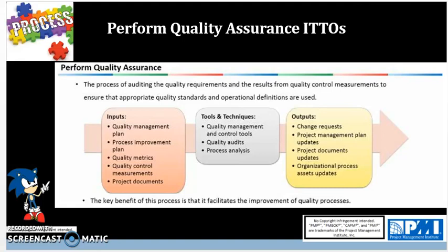Process analysis is a proactive approach that follows steps outlined in the process improvement plan to identify improvements and waste in the processes. We can do this through the use of flowcharts. And here we are identifying problems, constraints, and non-value-added steps and activities in the process operation. It also includes root cause analysis through the use of a fishbone or Ishikawa diagram to find the root cause of a problem. And process analysis is a great way to figure out why something went wrong.